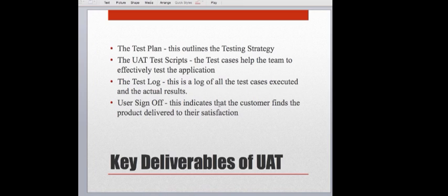And then the fourth thing is user sign-off, right? The important thing, our goal at the end of the day, is to get sign-off and approval so that these changes can move into production. So again, the sign-off is what indicates that the customer finds the product delivered to their satisfaction. It does not mean that there aren't defects, it just means that we really did give them what they were looking for.